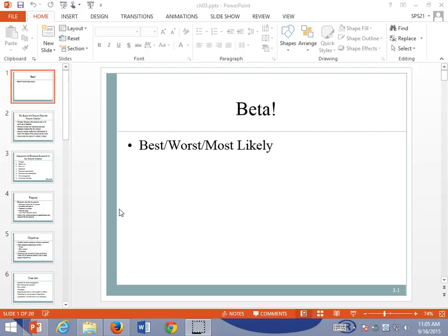One of the things we're trying to do in here is create what eventually we're going to call a work breakdown structure. The work breakdown structure is how we take our overall project and put it into what some people might call work packages. In other words, small enough units that we can actually start assigning resources. So who does what? How long do we think it's going to take?